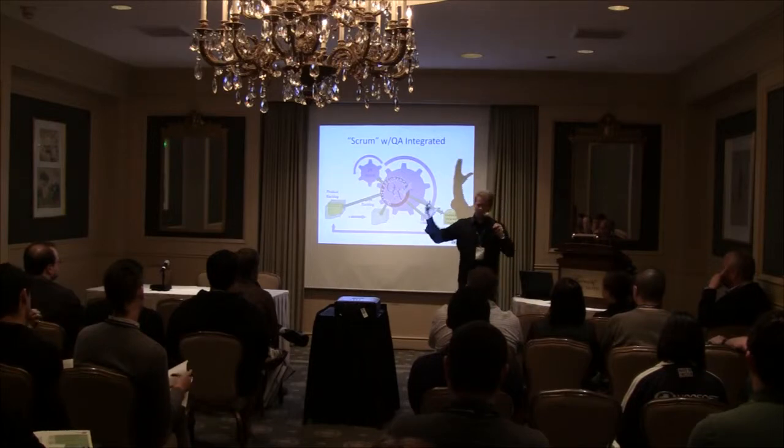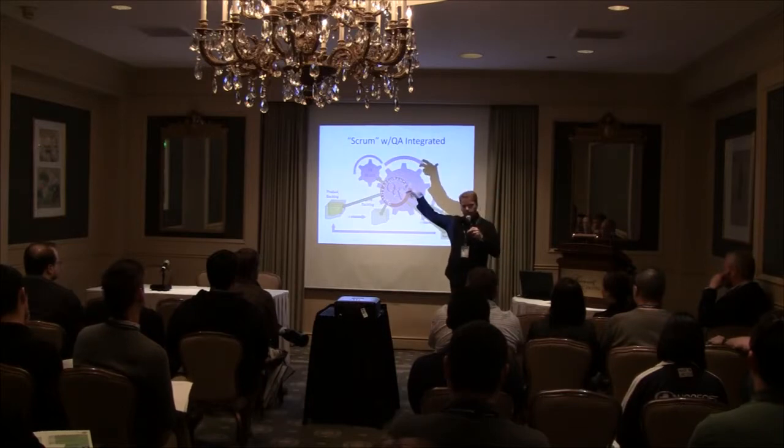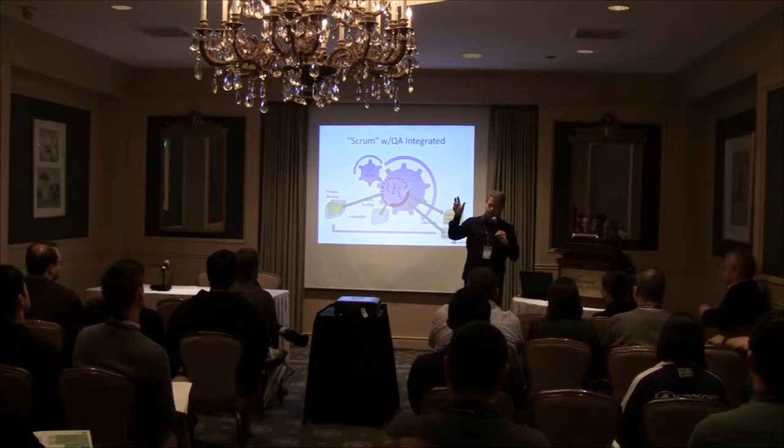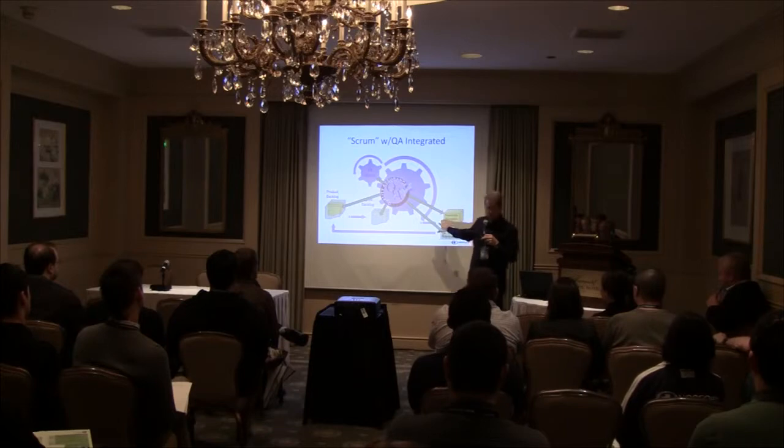Don't deliver one giant feature at one time and then expect QA to be able to go through and test the Microsoft standards, the Sony standards, and the game completion standards all in a day. So try to break up these sprint features into small sections that you're always chipping away at, so that when you get to the end of this time, you do have a potentially shippable increment here.